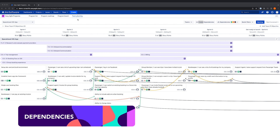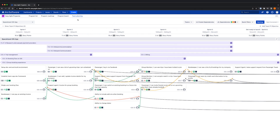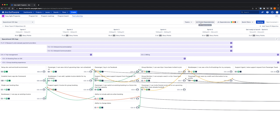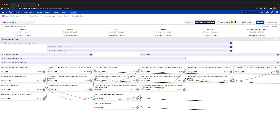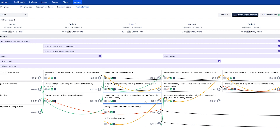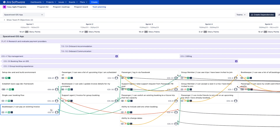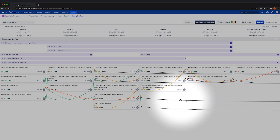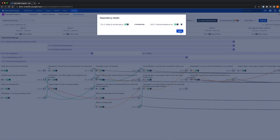We can see from the team planning board that we have dependency lines just like the ones we saw on the program board. It's from the team planning board where we can create dependencies within and across teams to better collaborate and plan together. To create a dependency within a team, click the Create Dependencies button. This will create the dependency link type that was nominated when the program was set up. If an issue relies on another issue scheduled in a later sprint, the line will be red, which means our dependency is critical. If the dependency we have is within the same sprint, our dependency is at risk. And if we rely on an issue being completed in an earlier sprint, then our dependency is healthy. When a dependency line is black, it means the dependency isn't within our current view — one reason for this is because the dependency is with another team.